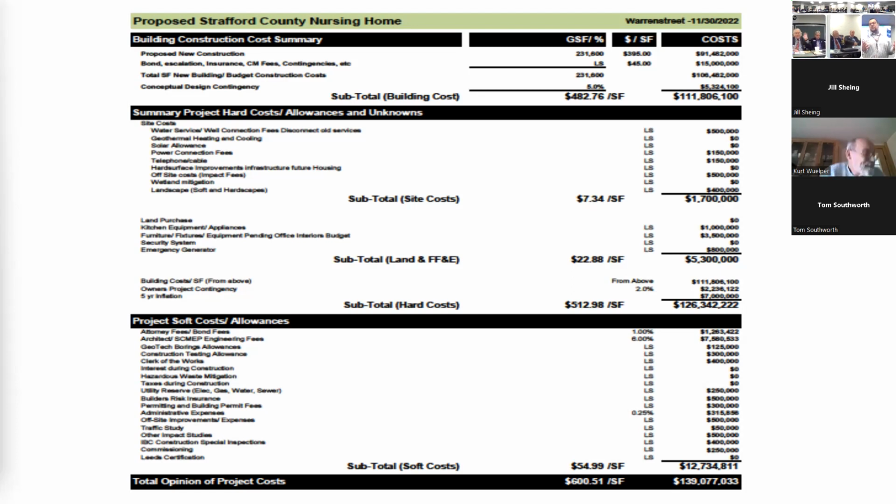And do we spend $1 million on new windows? We don't even know if we could get them, because they'd have to be the exact same size. If we disturb the window frame, we're into asbestos abatement. And we have PCBs in the caulking of the windows. So it would cost millions of dollars just to replace the windows, because we'd have to abate the PCBs. Not only that, we couldn't have residents in those rooms. So we can't tinker with that building.